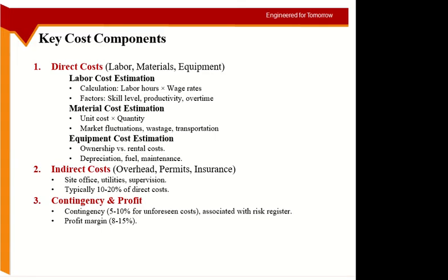Okay, and then productivity. So you are hiring the same people who can do everything on the site. Okay, so their productivity could be less. But let's say you are hiring specialists for steel work. So since they are specialists, they are supposed to do the work faster. Okay, and then they can charge you higher as well. In the previous lectures, we already talked about how you will calculate the number of people you need on the site. Okay, so based upon that, you can multiply with wage rate and calculate the labor cost.